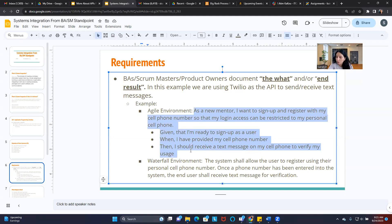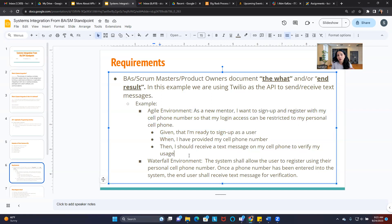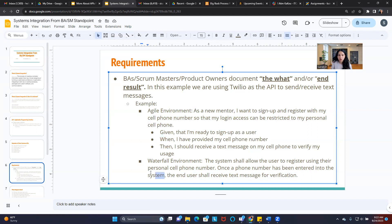Now it's on your developers to figure out if we are even going to be using Twilio as an API, or if they want to build this in-house — it's their job to figure that out. Your goal as a business analyst and Scrum Master is to identify what the requirements are. In the waterfall environment: 'The system shall allow the user to register using their personal cell phone number. Once the cell phone number has been entered into the system, the end user shall receive a text message for verification.' Our goal is to document the what and the end result.